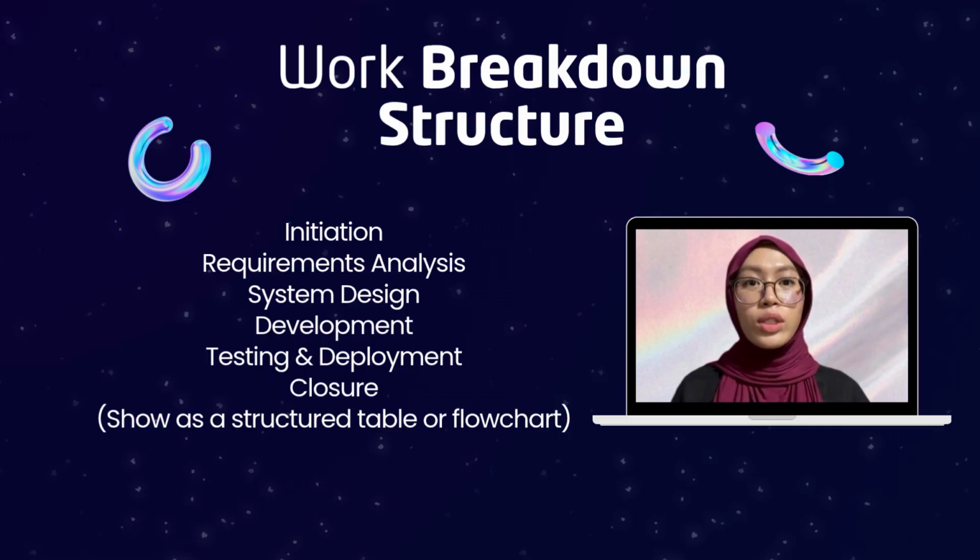Now the work breakdown structure for the Student Attendance Management System, or SAMS. This structure ensures that the project is executed in a logical, phased manner with clear deliverables at each stage. We begin with the initiation phase, where we define the project scope, objectives, and success criteria. This includes identifying key stakeholders and drafting the project charter to align expectations from the start.